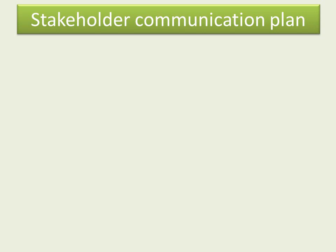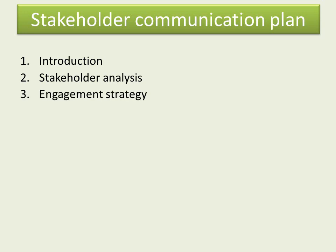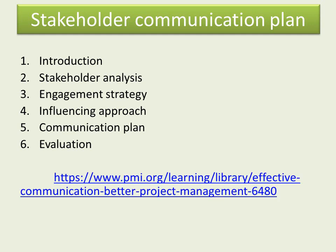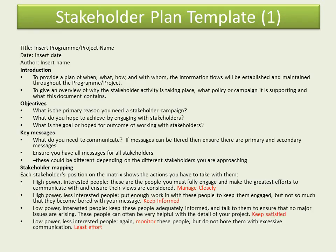The unit content talks about developing a stakeholder communication plan, and you have to be careful — it's more than simply deciding who we're going to communicate with, how, and how often. A stakeholder plan should have an introduction, some form of stakeholder analysis, out of which comes an engagement strategy, an influencing approach, and then the communication plan itself. Finally, you will evaluate how well the communications worked.